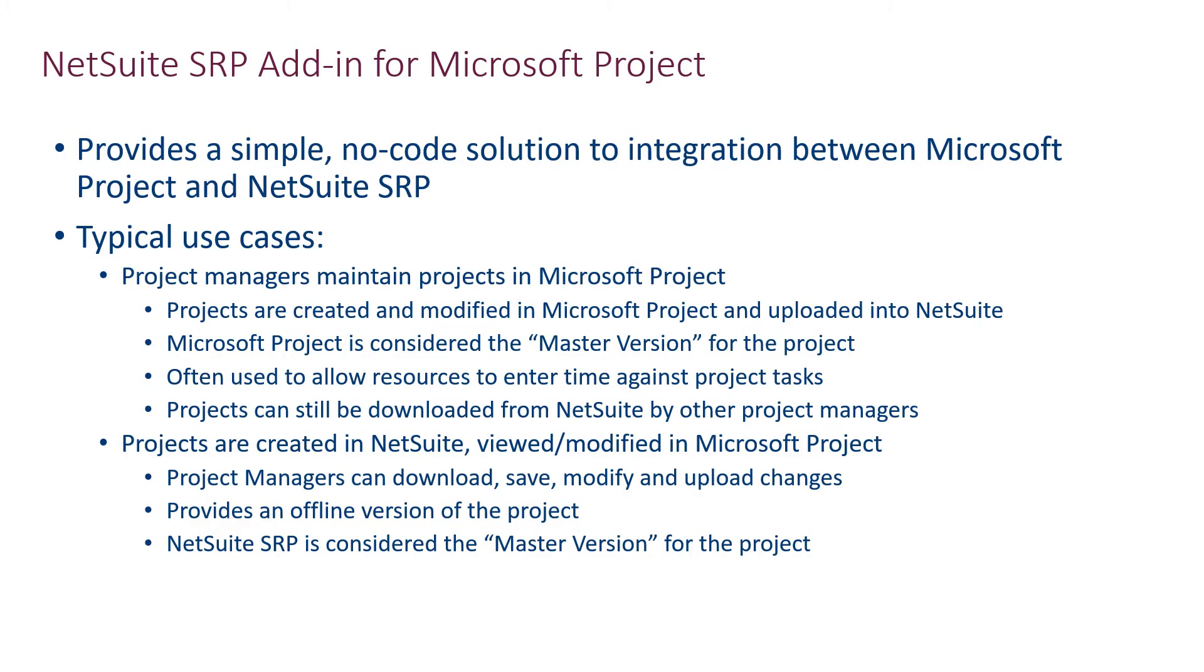The second scenario supports users maintaining their projects within NetSuite SRP, but still using Microsoft Project to download and view or modify them. Once changes are completed, they can be uploaded back into NetSuite SRP. The NetSuite version of the project would then be considered the master version. Let me demonstrate how this one works.